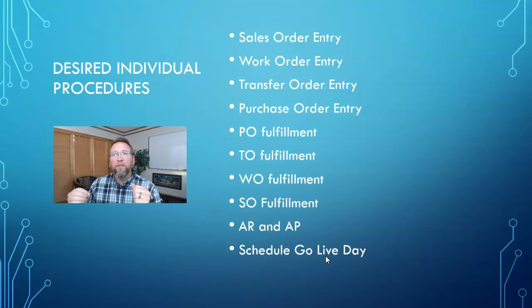And I say, "Okay, well then let's use that go live date as a goal. Don't tell anyone we're going to go live on that date. Let's just make it a goal between you and I, between the key person and myself. And let's try to achieve that goal, and let's do everything we can to prepare to meet that goal. But we're not going to know the exact day until the end of step 3."